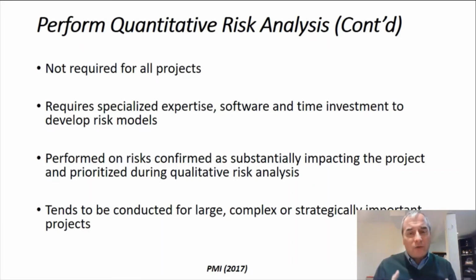You need to have software and time because you have to develop risk analysis models to be able to perform this analysis. Now, quantitative risk analysis is performed on risks confirmed as substantially impacting the project, having been prioritized during the previous step, qualitative risk analysis. Quantitative risk analysis tends to be conducted for large, complex, or strategically important projects.